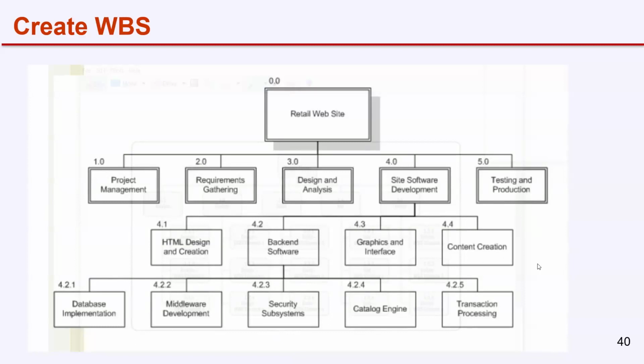Yes, sir. So in some cases, based on the schedule, we prepare the construction means registers also, for the monitoring and progress measurement system. So at that time we can put it as empty, and later once the project reaches that time, we can add these activities and monitor them separately, right? You can put it empty if you don't have enough information to decompose. Okay, sir. And later, when you are going to do that work, you will have enough information to do the detailed planning, then you will decompose further. If I understood your question correctly?